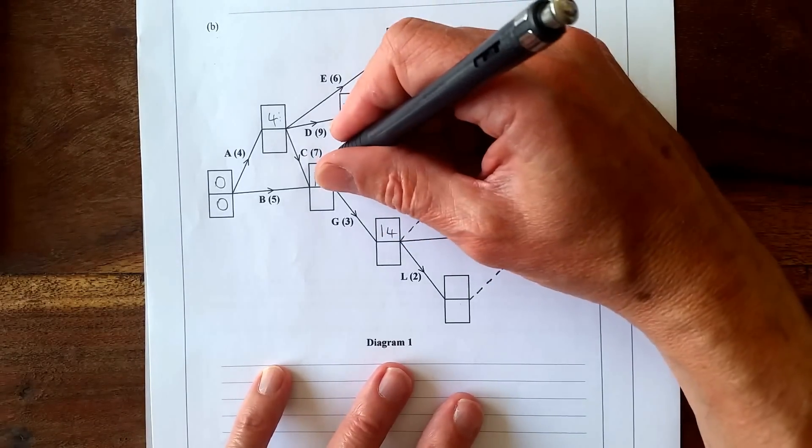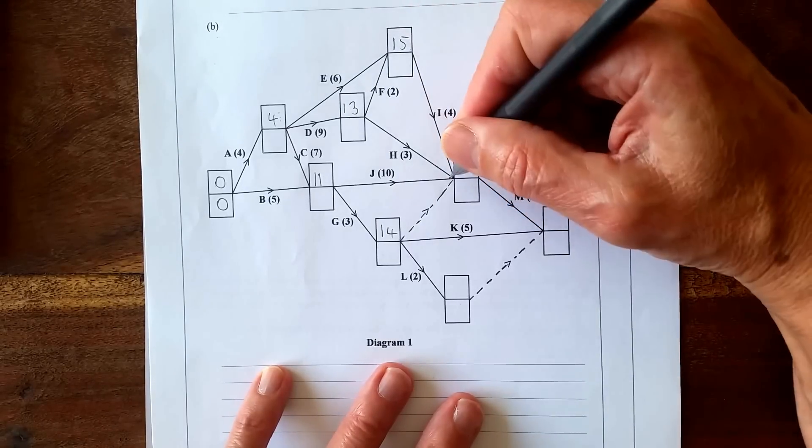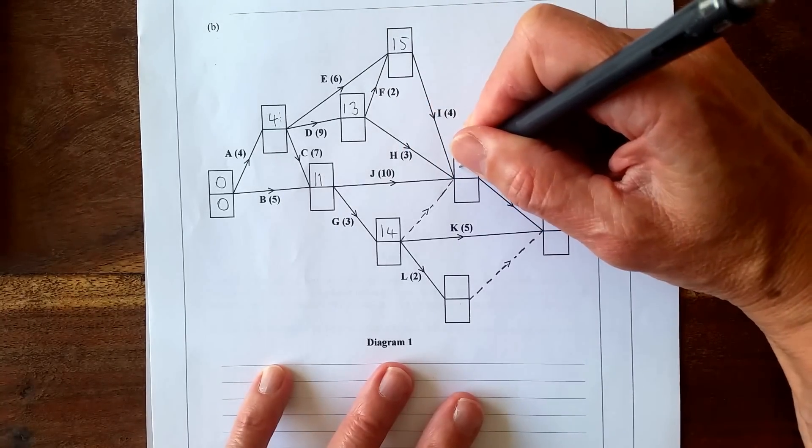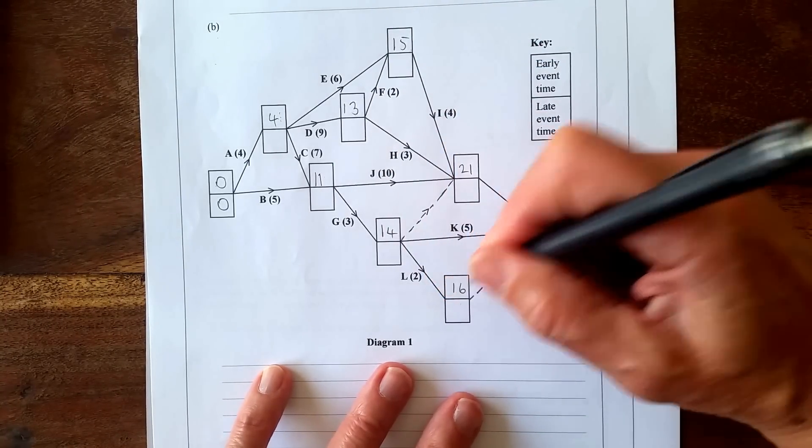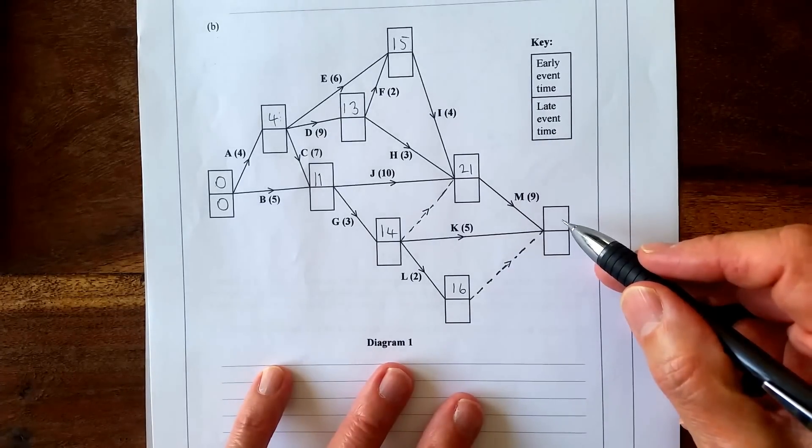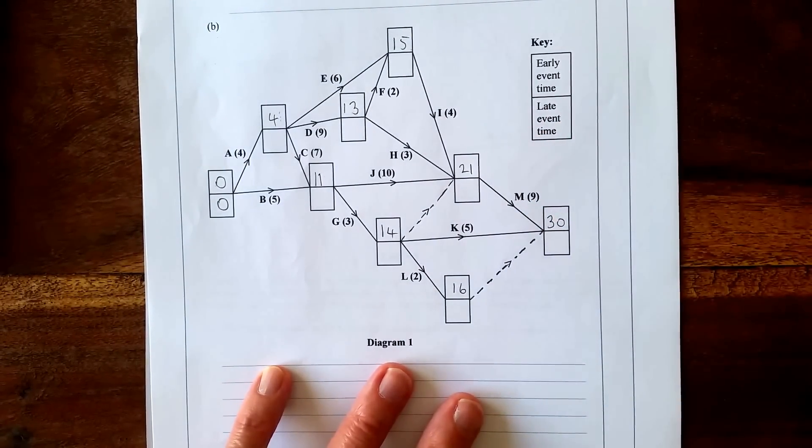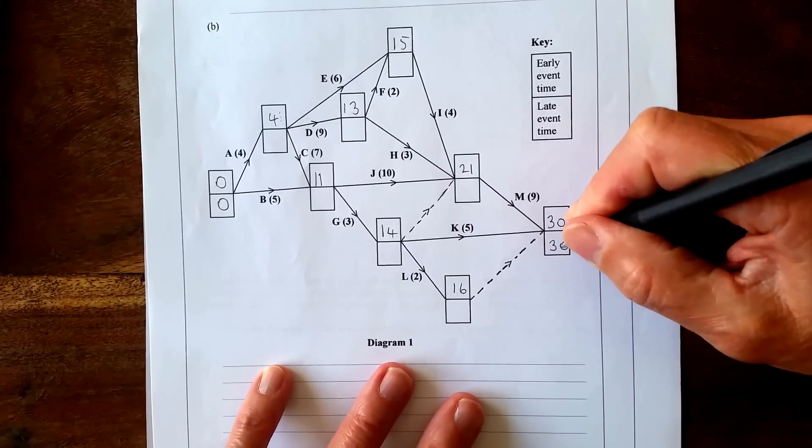11 plus 10 is 21, which is bigger, and 15 plus 4, 13 plus 3, so 11 plus 10 is the biggest, 21. 14 plus 2 is 16, and the W here 16, and 21 plus 9 is 30, which is the biggest.